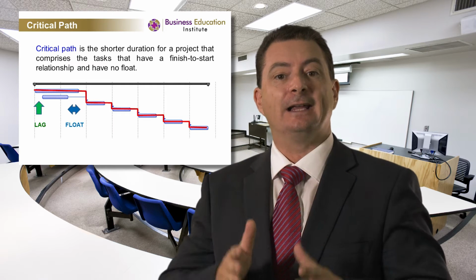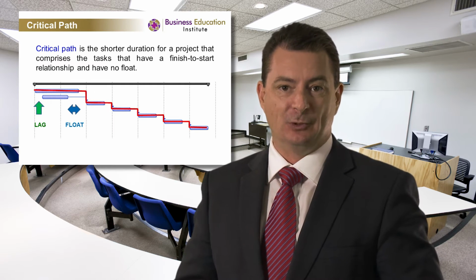Why do we move them? Well, that's clear when we need to allocate human resources. For example, if we had 2 tasks starting at the same time, but you wanted John to be on the first one for 2 days and then move down to this and start the second one on day 3, you would then move it along. So instead of starting it on day 1, you would actually start it on day 3. And of course, if you've left some float behind at the end, if it is running late, it's still not going to impact the final schedule.